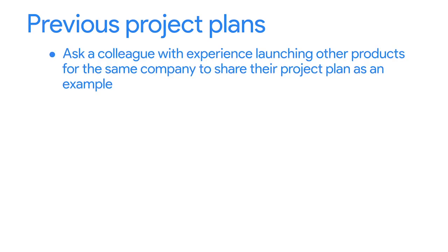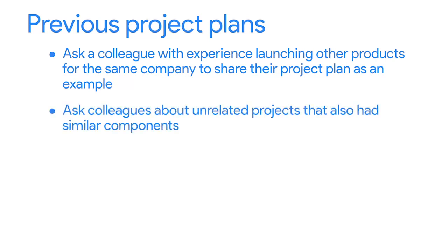It's also helpful to review an older project plan for a similar initiative to find out what kind of tasks were included. For example, if you were a project manager tasked with launching a new product, you might ask a colleague with experience launching other products for the same company to share their project plan as an example. Or, if your project includes some construction work, you might ask colleagues about unrelated projects that also had construction components.